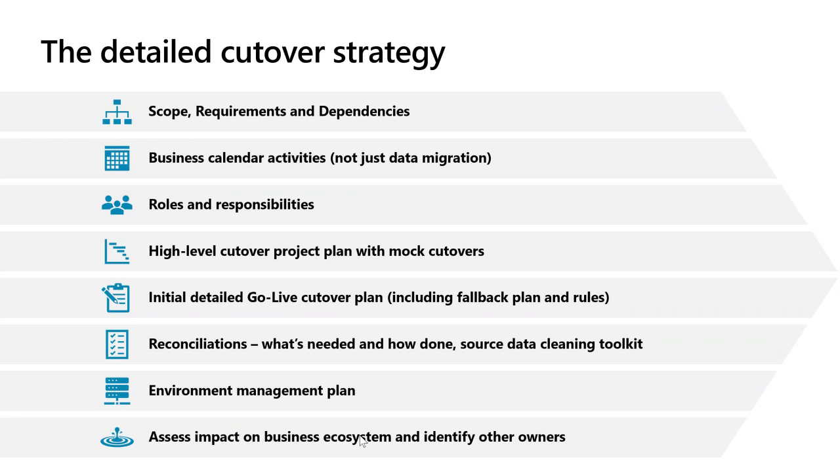You'll have a high-level cutover plan where you'll be defining the points at which you're going to do your mock cutovers, where you're going to do your data migration trials, and when you're going to have data needed for testing, training, etc. And you're going to start your more detailed go-live cutover plan. When you first start in the implement phase, it may not be very well fleshed out, but you're starting it at this point because you want to set the right tone, the right formal discipline for what needs to happen at the formal go-live cutover.